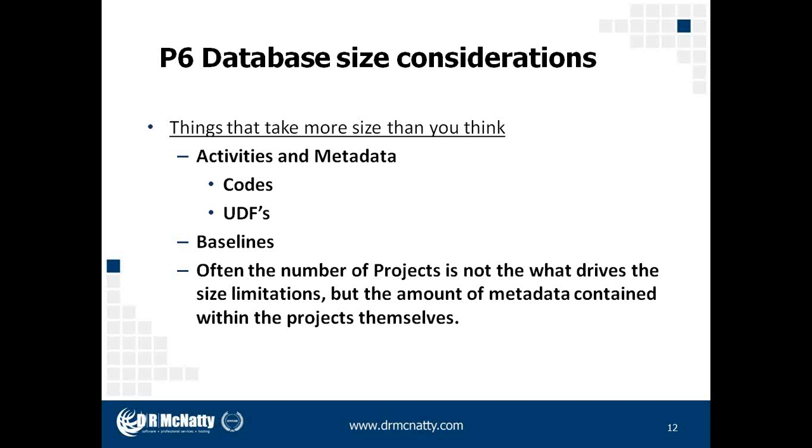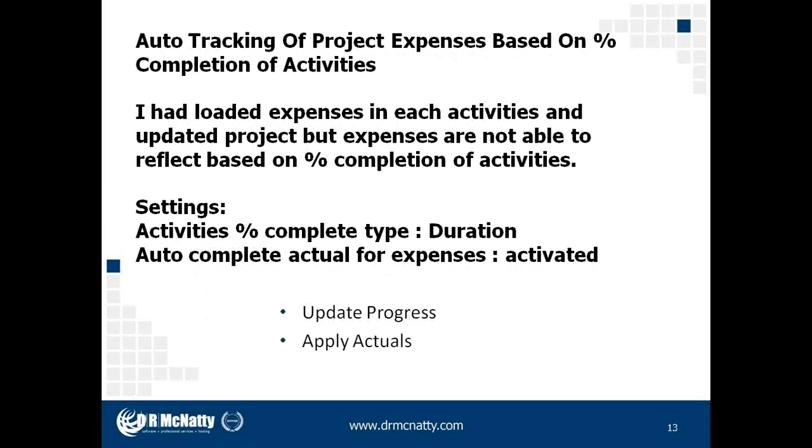Baselines would not be the metadata, but baselines are one thing that we like to make a lot of copies of to make sure that we preserve what we've done at this point. And those are the things that, if you do run into this, to try to reduce the size of your database, to look at some of these items that you could possibly remove. The other option, as Oracle will tell you, is to deploy it on a standard Oracle database.